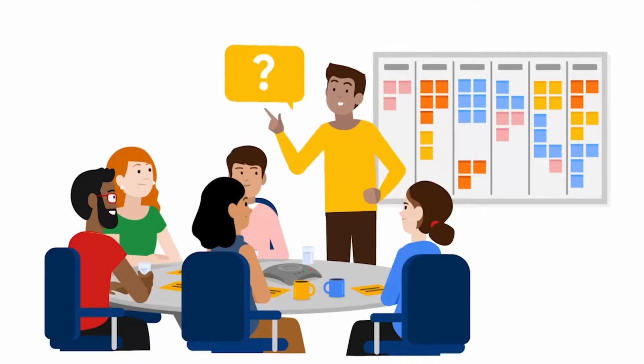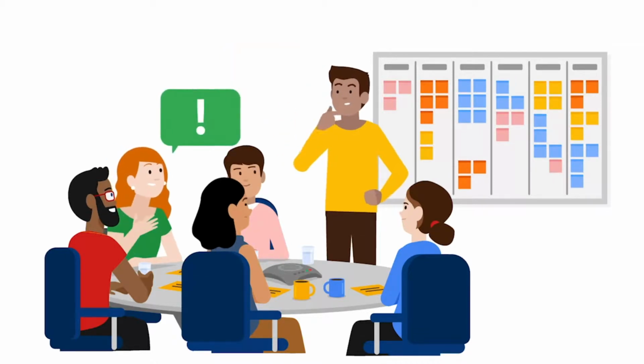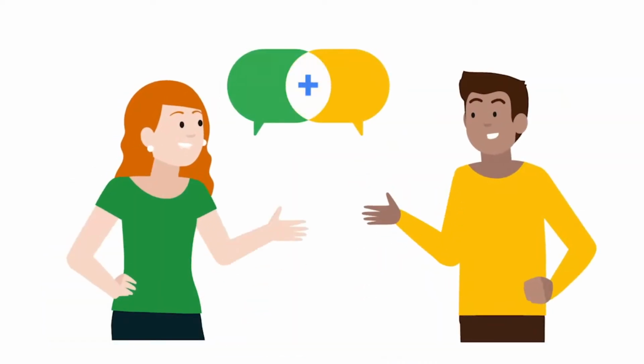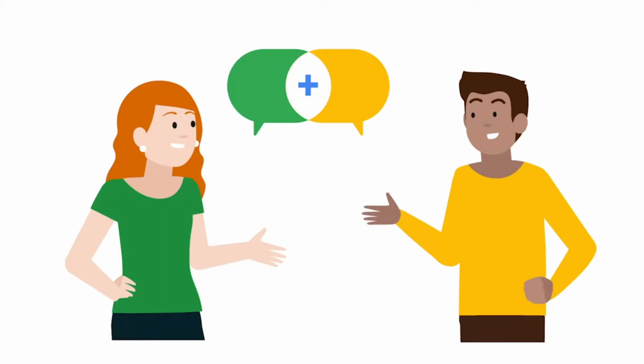Let's explore some more examples of how to blend methods. Let's say your project is to develop a software product. During the retrospective for the last sprint, a team member says, "I need to implement a certain feature, but I don't have much experience building that particular feature." Someone else on the team is an expert on that feature, so you decide to pair them up so they can work on building the feature together during the next sprint. You've just blended XP and Scrum. XP provides the basis for working in pairs from pair programming, and retrospectives are a key component of Scrum.